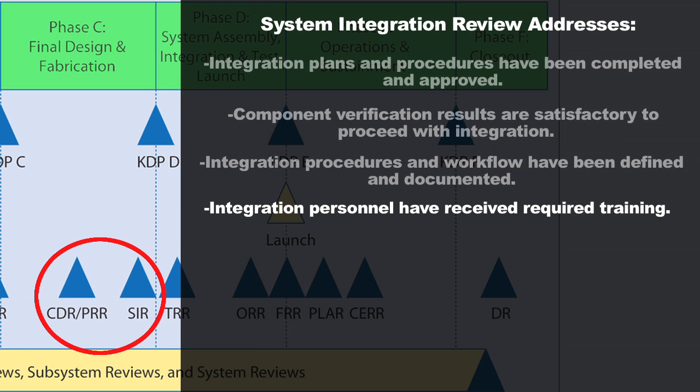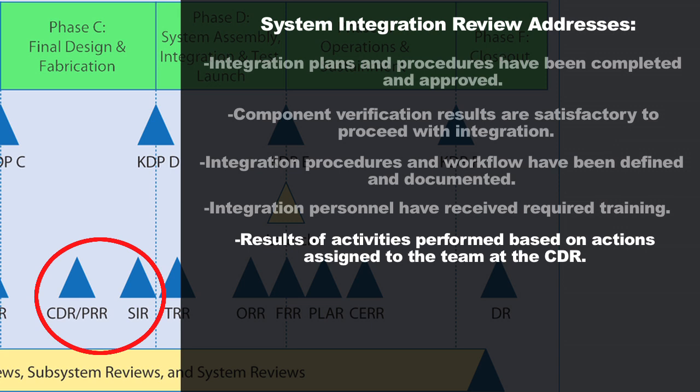The technical team will also want to know that any open actions from the Critical Design Review have been closed out. These major reviews are the key ones that allow the system to proceed to the next level of maturity. There are also test readiness reviews — done right before each test phase, whether testing a component or a full system, to make sure all defined procedures are approved and well-developed. Those are done at a very low level with engineering peers, sometimes just a few people at a table. The major reviews, by contrast, involve a large external team coming in to really make sure you're ready to proceed.